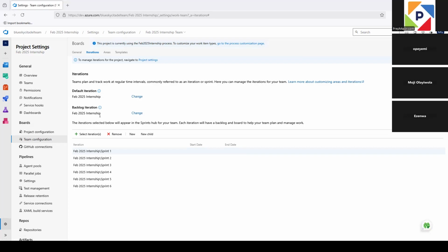So it's put it on the backlog. That means whatsoever the BAs are creating goes into the backlog. It doesn't come into the sprint. It stays in the backlog where it's meant to be. So that is the first configuration we want to do, to say that it stays in the backlog. Okay, so that has been done. We don't need to change the one at the bottom. That one is okay. It's just this one on current iteration that we need to change.